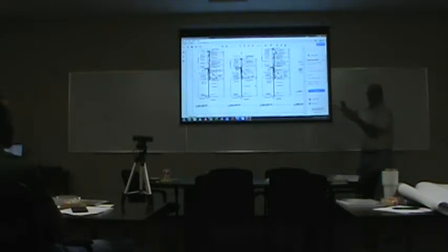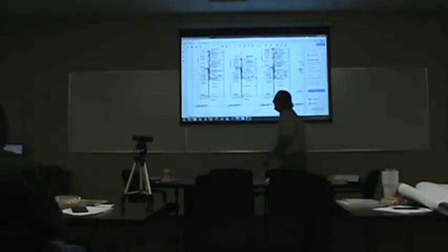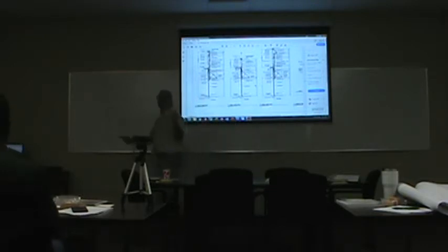So as you look ahead on your schedule, you look ahead several weeks. It helps you to anticipate where your problems are. Little rule of thumb. The office, project manager, executive in charge, should give you the overall schedule. Okay? And they should help you manage that job on a month-to-month basis, or longer, okay? Superintendent is 100% responsible for a two-week look ahead, maybe a three-week look ahead. You understand what I'm saying?